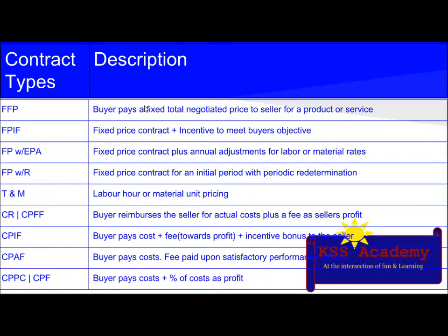This type of contract has highest risk and high profit potential for sellers. It is suitable for well-defined scope or design. It takes time to negotiate. Scope changes will increase the price, and proposal costs are generally absorbed by the vendor.